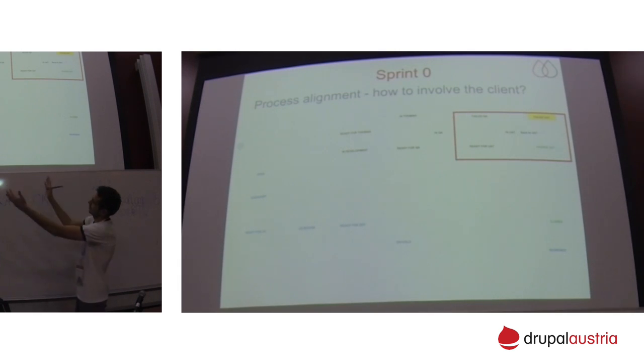So this is the first phase of involving the client. Then obviously, once the acceptance criteria is amazing, it goes to the ready for dev state, and if the ticket is prioritized and goes to some of the sprints, it goes to development, then ready for QA, and so on, like the known flow that you're using, I guess, for your projects. Then, once we consider that everything is great with this ticket, we have zero bugs and we have covered the acceptance criteria, we do user acceptance tests for every single ticket. And as I showed, in the old school way we are not waiting until the end of the project to involve the client, but we are throwing to the client every single ticket that is in state ready for UAT.